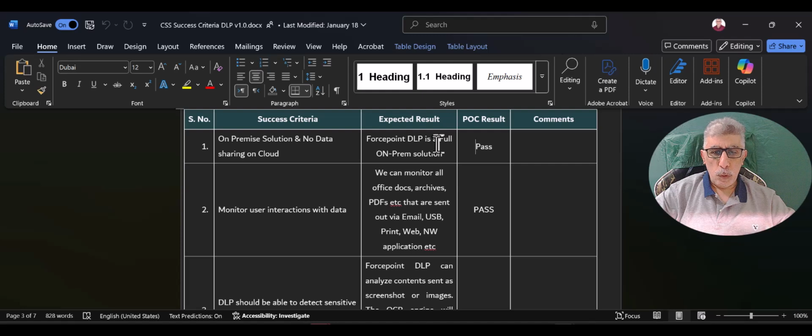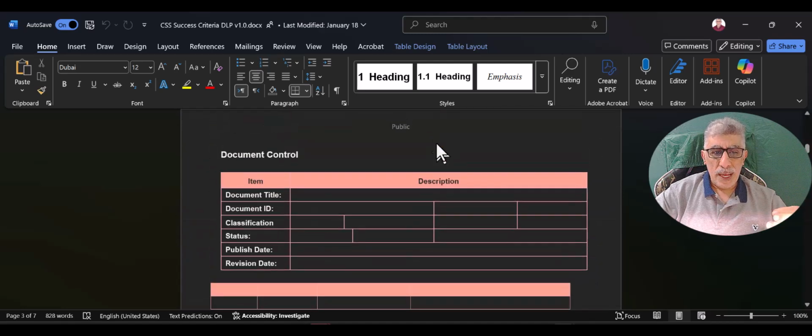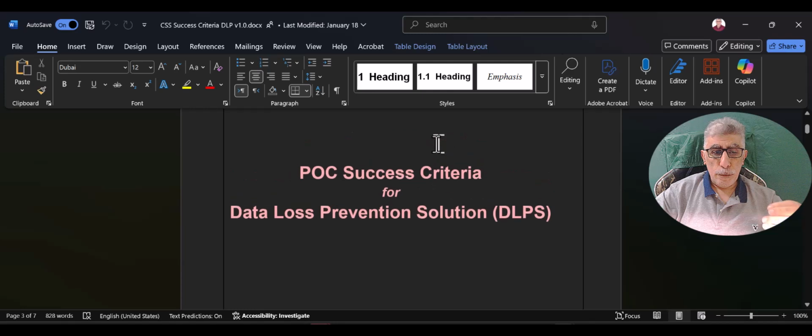And finally, once we get a confirmation from one or more vendors, we request the POC, and in this POC, we should test the functionality according to what we prepared at the beginning. This will leave no chance for any mistake, or that we purchase a product and find out that it's not protecting all our assets.